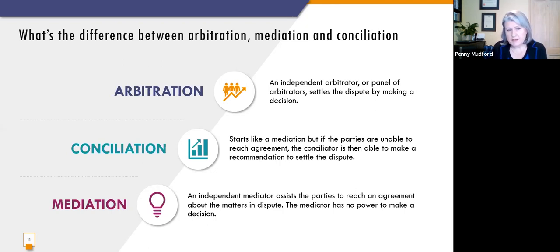I'll talk now about mediation. I referred to mediation as a process as an example just before. In that context, a mediator is an independent person that assists the parties to reach an agreement. A mediator doesn't make a decision, has no power to make a decision. Mediation is voluntary.